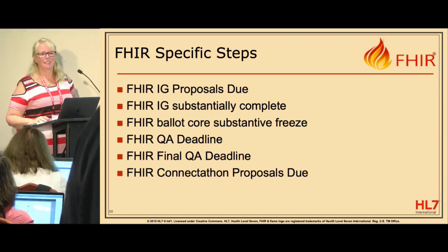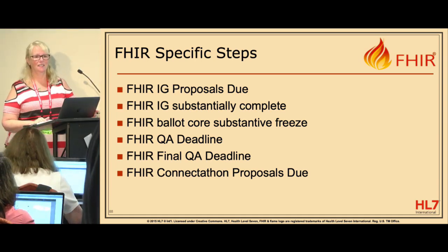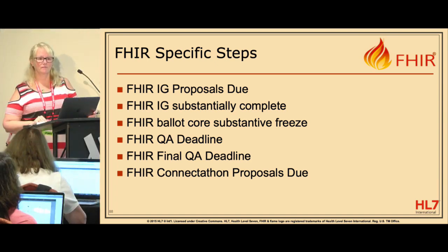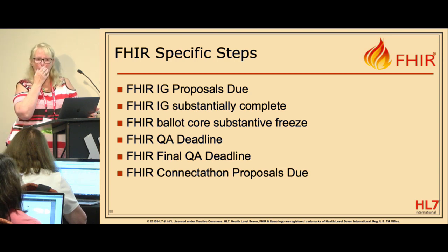So I was just going to offer a hard example of that. The Cancer Interoperability Group did a PSS for breast cancer, and now we've done a NIB for radiology on breast cancer, and then we're going to do pathology and then oncology and then surgery. So all of those would fall under one PSS. But each currently needs a NIB at each cycle, and then has to re-go through the IG publication process. But I was just going to make a comment, it'd be really helpful if we could merge together those two steps at the point of time when we do a NIB, just merge in the process of an IG proposal.